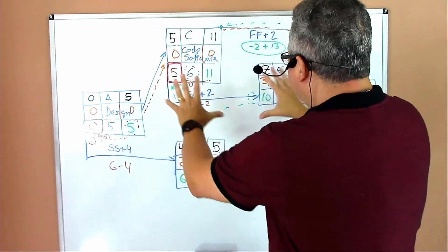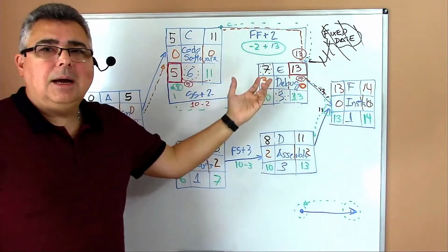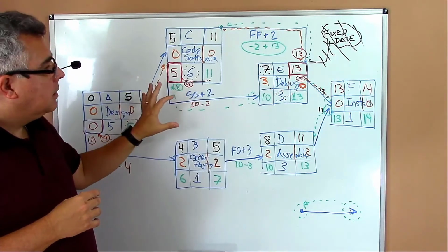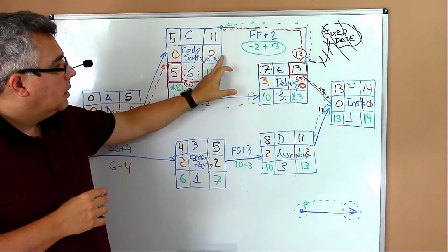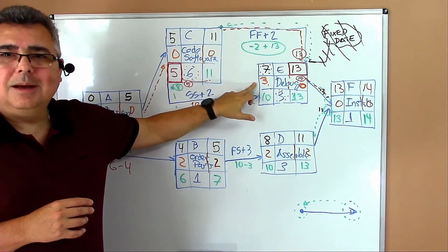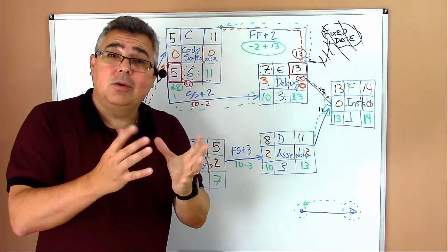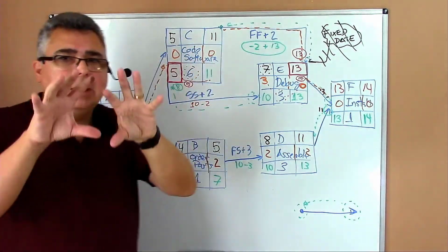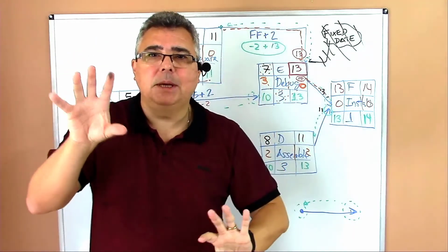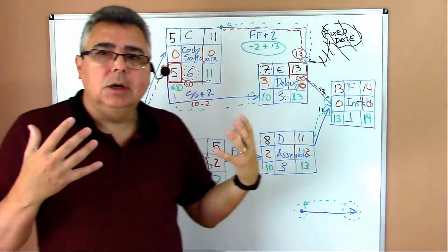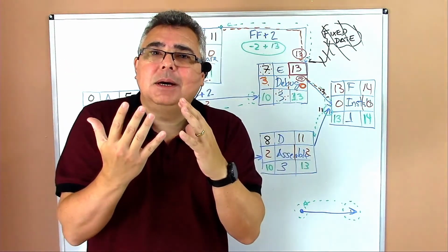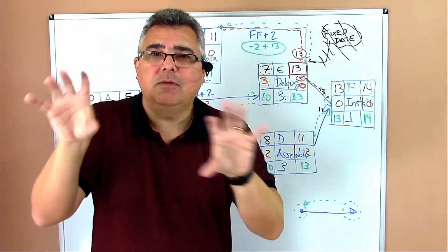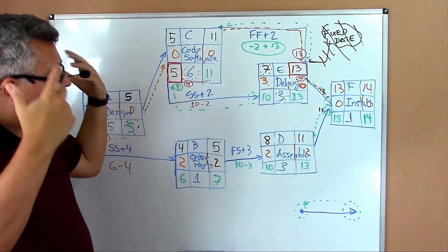So let's go here. Debug is a task in which you try to find errors in the code. Usually you do the debug after the code. After you finish the code, you try to find errors in your software code. But because the software is done in pieces, you can do one piece, then another piece. Maybe what the project manager identified here is that I can start the debug before the end of the coding and start testing individual pieces of the code. And probably that was the reason behind the start to start.